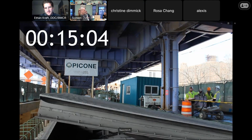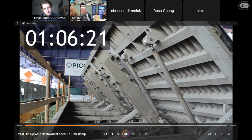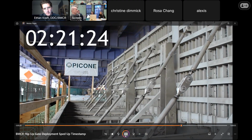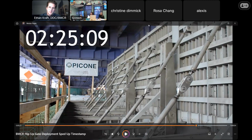How much does one of these cost? That is a great question. I'm not sure. A ballpark? Jordan, you know. We can find out. Yeah, we can get back to you. Well, what do you know? I know this project has come in; there were moments where this was a $400+ million project. It is $350 million and it's staying on budget. Congratulations. But is most of it in these gates? It's a 0.8 of a mile project overall, and certainly more than half is these flip-up gates. I think it's closer to 3/4. Oh, really? And where are they made?